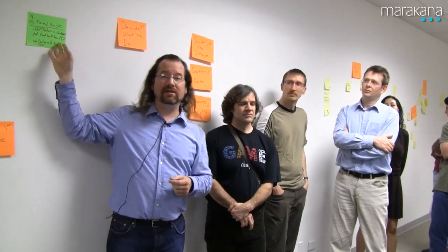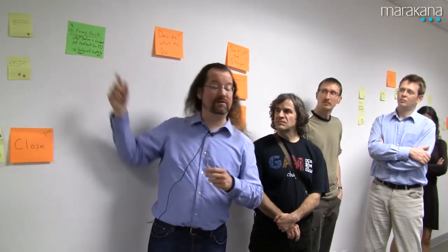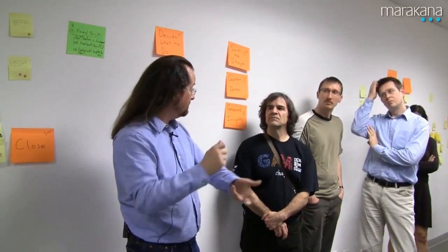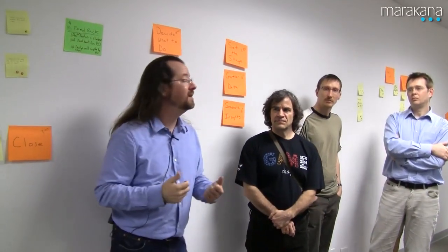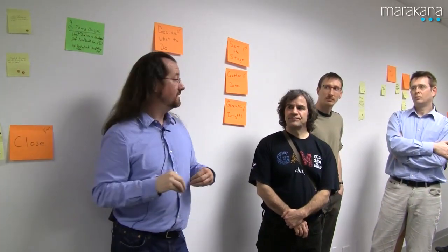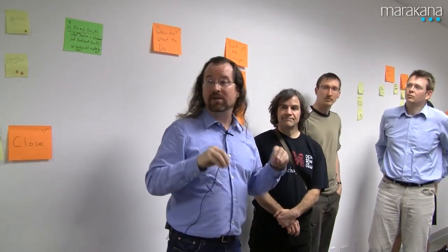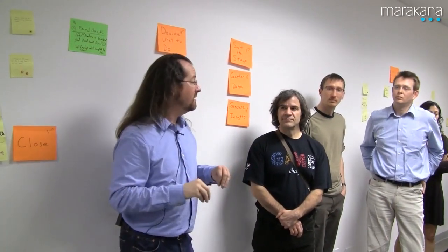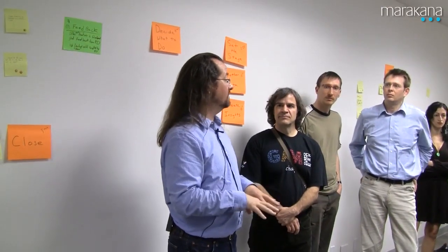Yeah. So what I like about this in that case is the team has come up with something they can do. The team can, after the feature is developed, go back to the product owner and hold them down and do the demo and get the sign off, the thumbs up or thumbs down. And it's really important, coming out of a retrospective, that the action item you come up with, the experiment that the team is going to run, is something that is within their control to do.